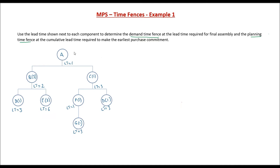This is a BOM given to us. A is the end item and you have multiple sub-assemblies and then you have the final components which are to be procured. Based on this and the lead time that has been given to us, we have been given certain conditions to find out the demand time fence and the planning time fence.